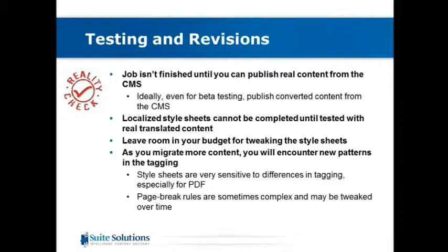I mentioned this a second ago, but I'll mention it again. It's very important. When you have a budget set up for both time and financial budget, you want to make sure that you leave some of that left over at the end, or you set aside a specific amount for making certain changes and small tweaks after you think the project is over, because inevitably you will find something later that you want to add or change or possibly that got missed.